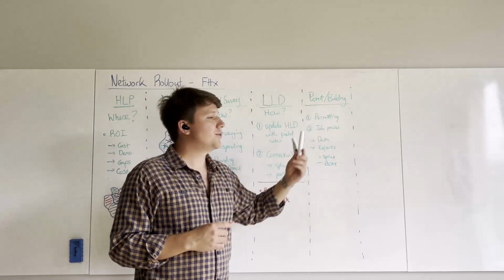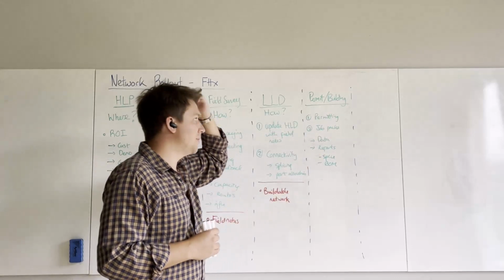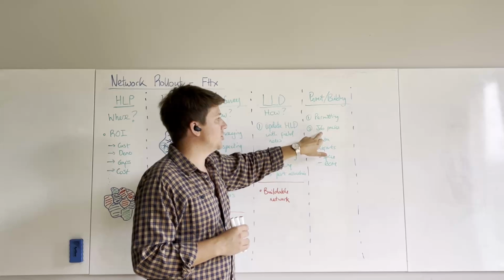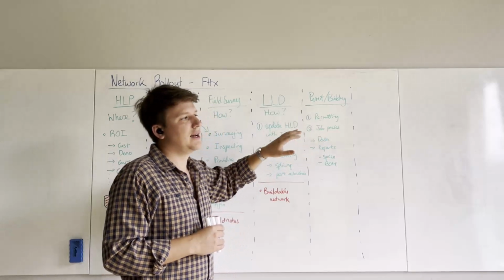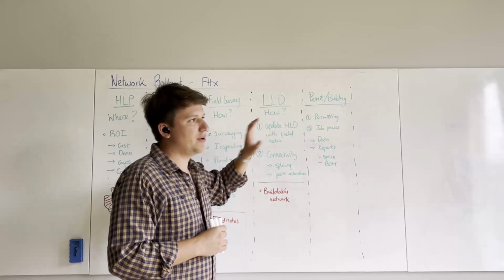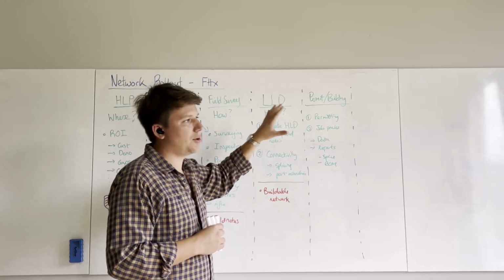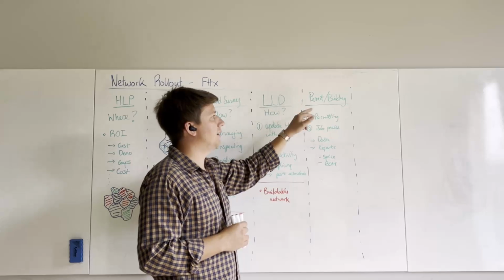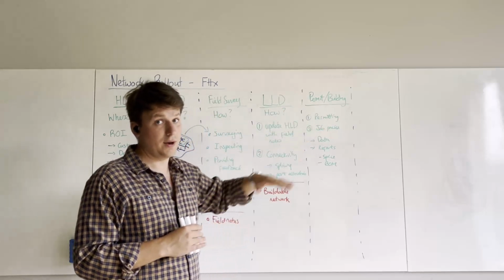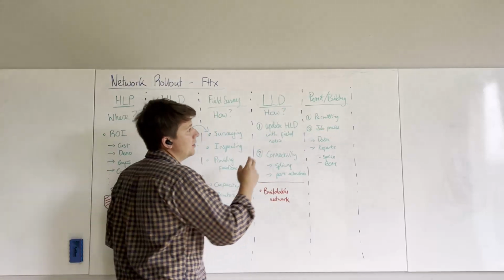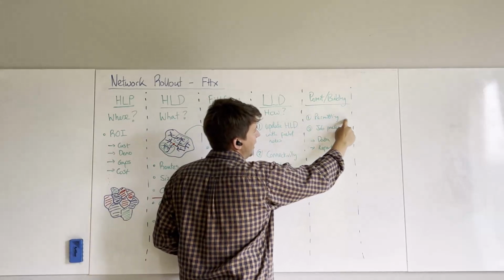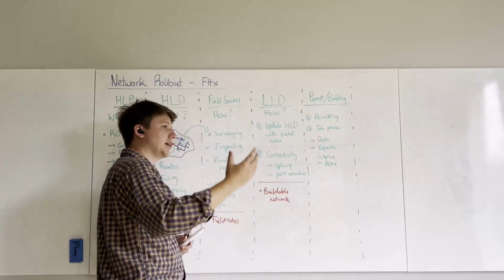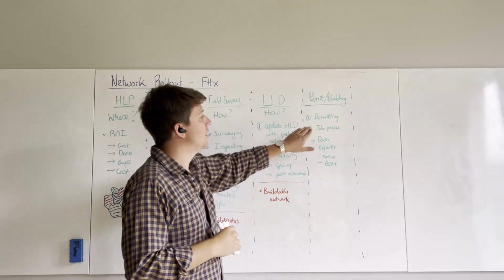Permitting is really important. What we found as a company, standardize both the job packs and the permitting, the way that those reports are generated, and you will get rid of the most commonly talked about issue in build out, which is permits, which is slow. What we found helps the most is if you can just set this into a typical standard work packet that you create, where you just for an area click a button and it generates all the reports.